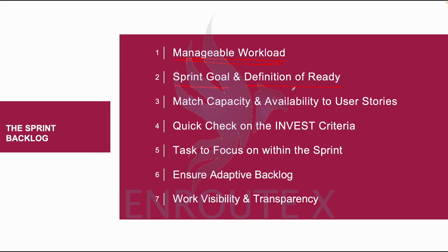Any story that does not meet definition of ready should not sprint. And that relates back to this, because when your team members have, let's say your team has a total of 10 hours to work, and you are accumulating the total tasks for 25 hours into 10 hours, that means they do not have the availability to finish that work. Such a story does not meet definition of ready. It doesn't matter how highly prioritized it is.